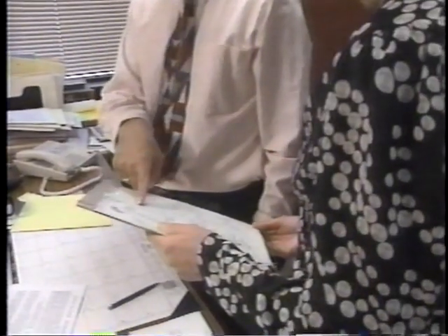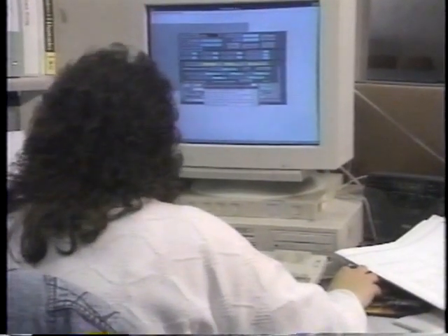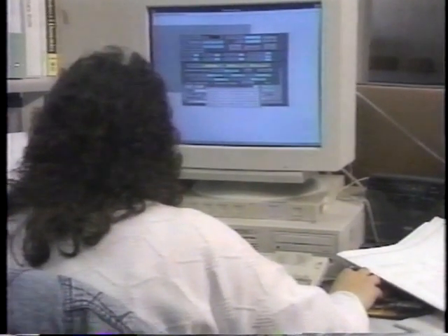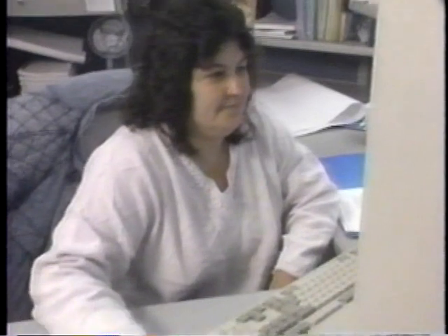The number of personnel needed in each classification is determined by applying skill level guidelines to the distributed manpower requirements. Computations are made for each activity and totaled to determine a profile of skill level needs.